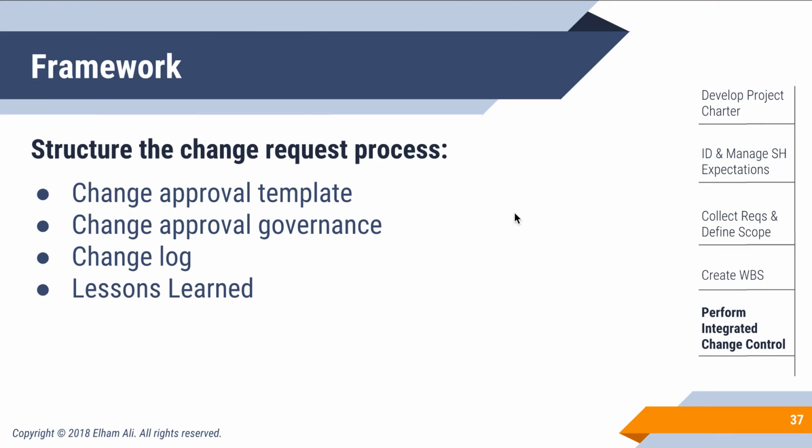And you also have to have templates, right? Your team members can't request changes out of thin air. They have to have a template to log them. And there should be a change log where you're documenting all these changes, whether it's a change in a specific Word document or a major change in a technical requirement for a product. Then you also want to document lessons learned. In every project that I've completed, I always ask team members and also managers what they have learned and what knowledge areas we could have improved on and grown better at, knowing what we know now.